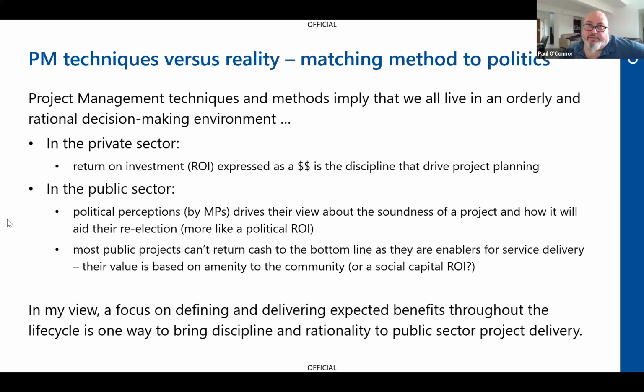The state is changing that toll road model with North East Link. The state will be the toll collector. But the state only did it to de-risk the project because there was a lot of market concern about whether there would be enough people to make it stack up. The private sector builders didn't want to take on market risk of the tolls, and so the state ended up taking on the market risk. Now, there's no guarantee that the state will collect enough tolls to pay off the cost of building the facility.